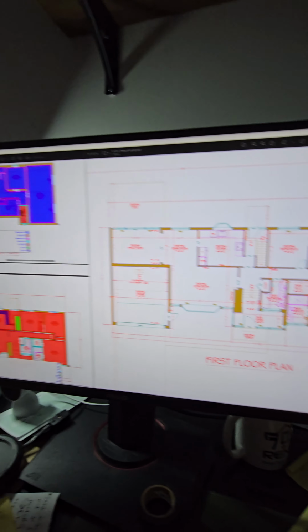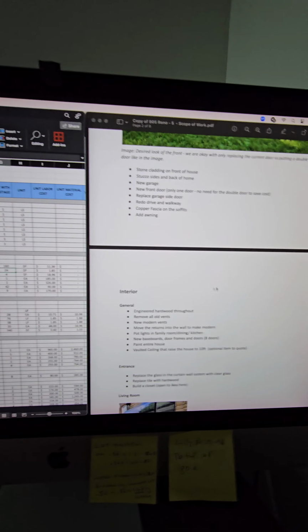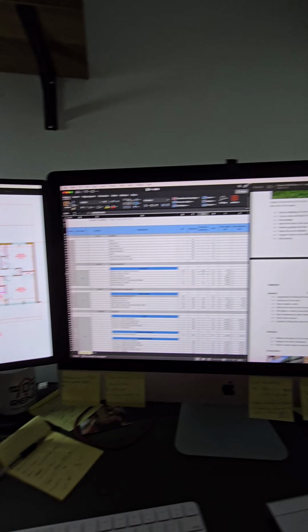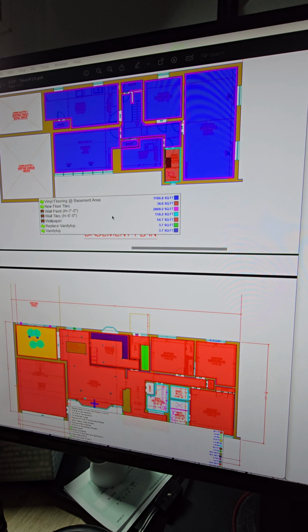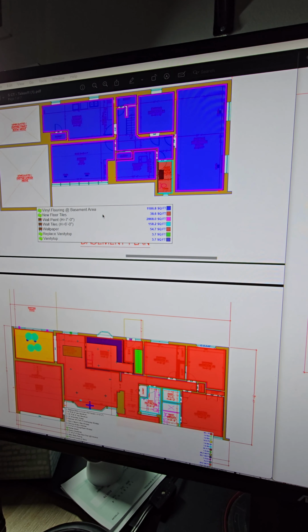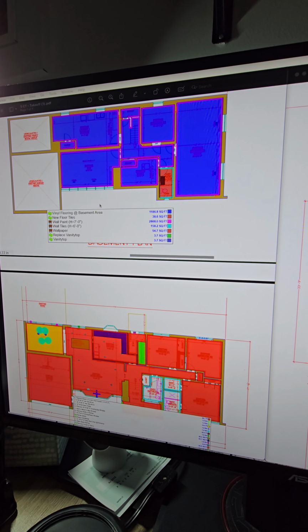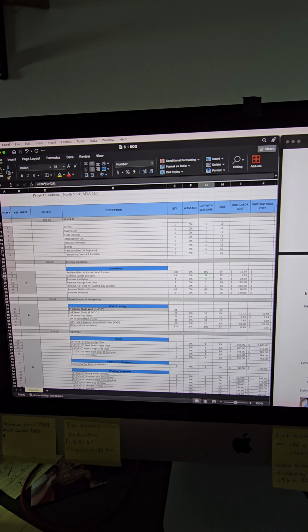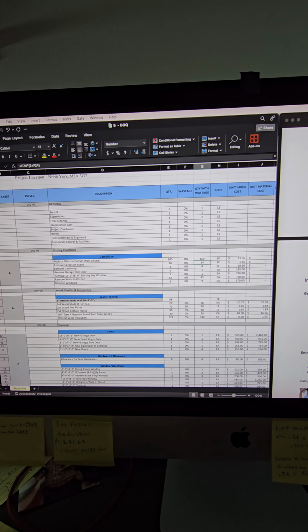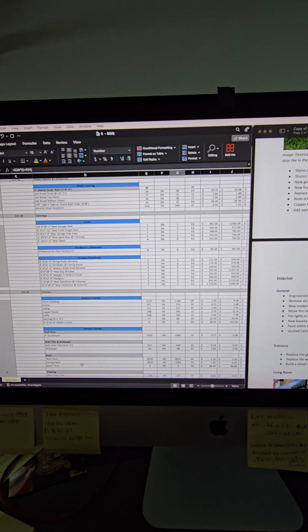As I said, step number one, you get the drawings, the scope of work, and you get your estimation system. Either you do highlighting, or I use a software that does the estimating and all the takeoff, get your measurements confirmed, and put it here on the spreadsheet. It gives you a total number when it's all said and done, and that's what goes in the proposal. And that's how we get our estimating out.